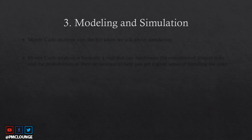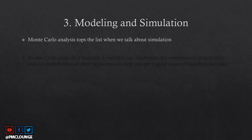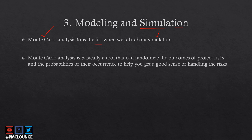Number three is modeling and simulation. Monte Carlo analysis tops the list whenever simulation is mentioned in your PMP studies. Monte Carlo analysis is a tool that randomizes the outcomes of project risks — it randomizes the outcomes and even the probabilities of their occurrence. This helps you get a good sense of how you are going to handle the risks and what all the possibilities are in terms of outcomes, which is where Monte Carlo analysis comes in handy.